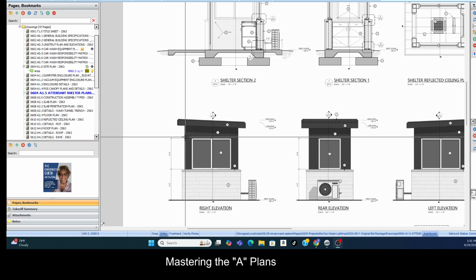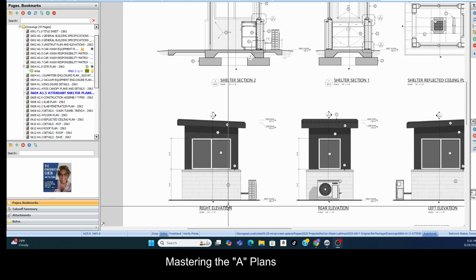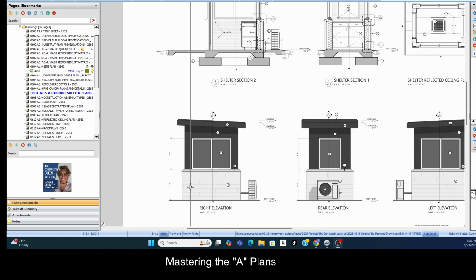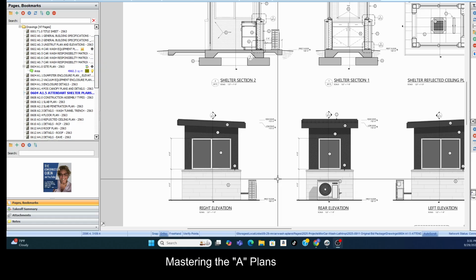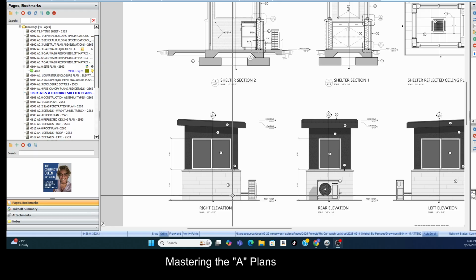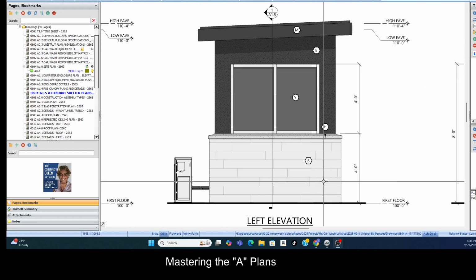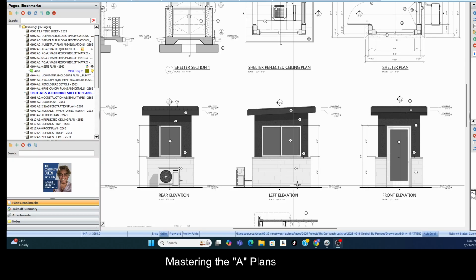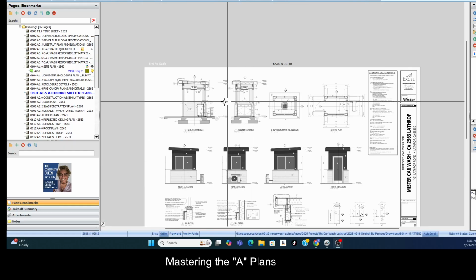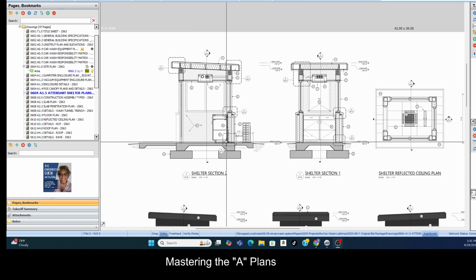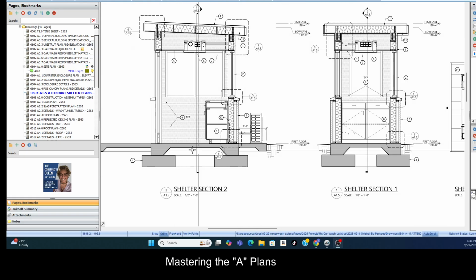The top part is the structural portion, and all of this is the A-plan portion, except for any concrete foundations, any rebar. Because this may be CMU block, then all of this is going to be in the structural set because it's a structural scope of work. Very crazy. Okay, so foundation, footings, all of that.